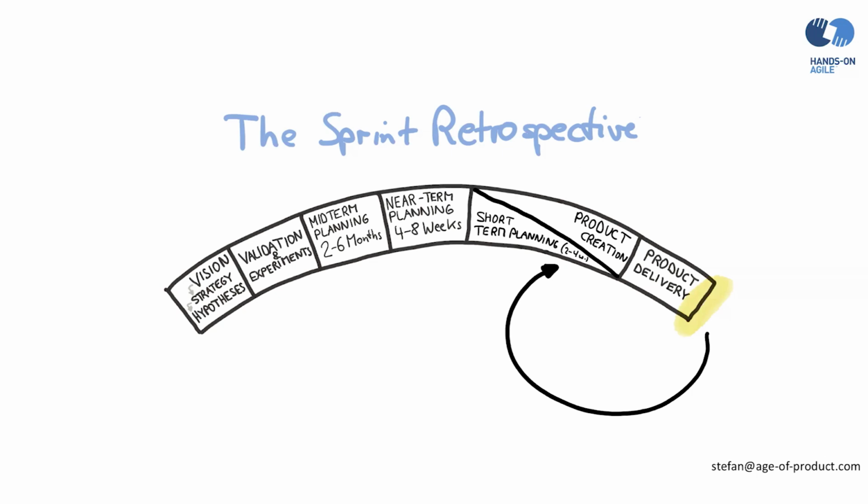The purpose of the retrospective is to inspect how the last sprint went with regards to people, relationships, process, and tools, to identify and order major items that went well and potential improvements, and to create a plan for implementing improvements to the way the Scrum team does its work. The Scrum Master encourages the Scrum team to improve within the Scrum framework.